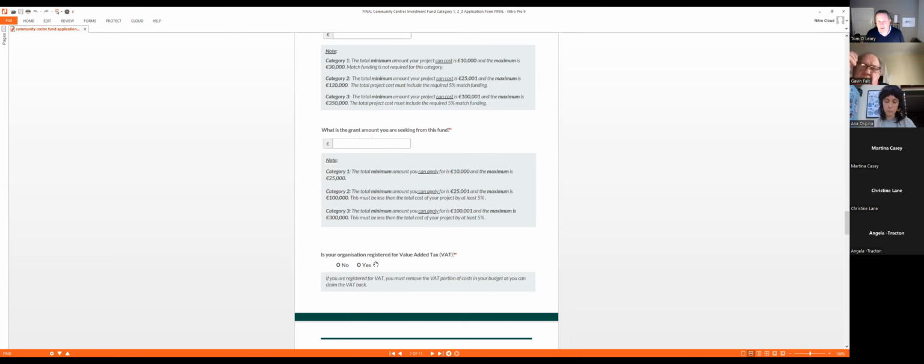The reason why you have to answer this question, if you're registered for VAT, let's say your project is costing 30,000 euros plus VAT. Okay, or just to make it easier for myself, let's say it's costing 10,000 euros plus VAT, so it's 10 grand plus 13.5%. So in this case it costs 11,350 euros, including VAT. If you're not registered for VAT, you can put in the total cost of the project as being 11,350 euros. If you are registered, you can only claim for the VAT exclusive amount of 10,000 because you'll be claiming the VAT back from Revenue anyway.